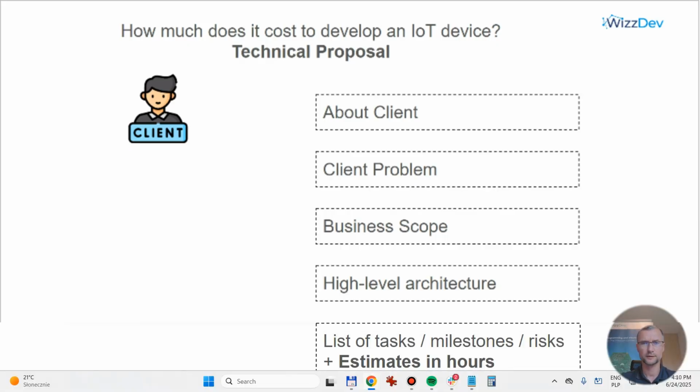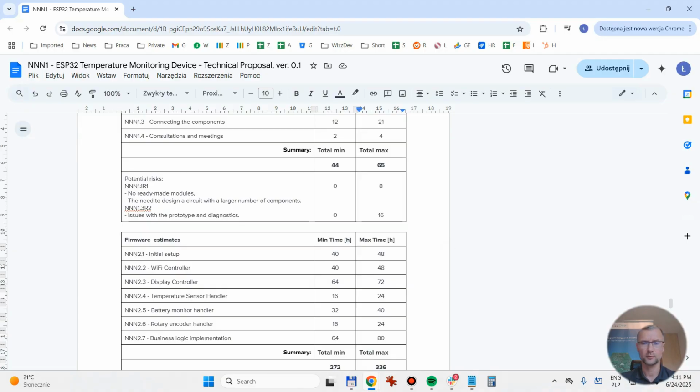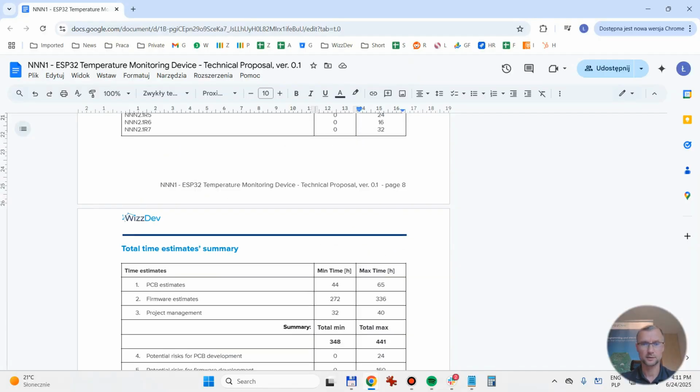And they have flexibility for the clients to change the milestones that are coming, to add some content to some milestones, and if this is not affecting the overall budget, then this will be accepted. If we see that the change will affect the budget, like the min and max hours, then we immediately let the customer know that this has to be altered, or the proposal has to be changed in the future. So that's a quick overview.